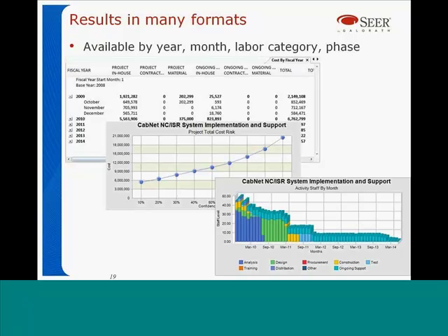Once you have these things all together, SEER-IT provides a very rich reporting environment. It has estimates by activity and phases. It also does risk analysis. It will look at a roll-up of your Monte Carlo analysis to see what the cost is and where the schedule is at a summary level. You can look at your time-based reports, as well as resource headcount requirements in here. This chart in the lower left will show what you need up front to deploy the system, and then once you go into ongoing support, what kind of headcount you need to support that system.